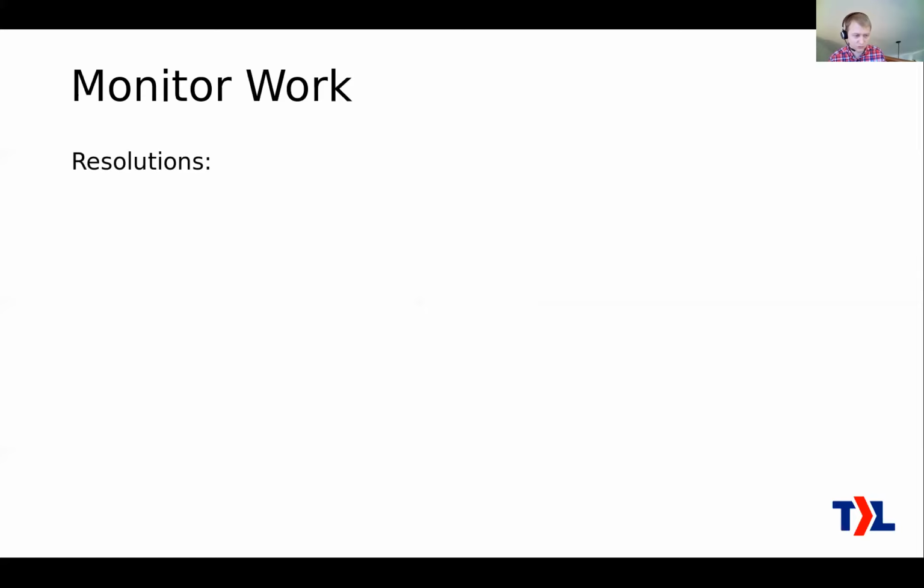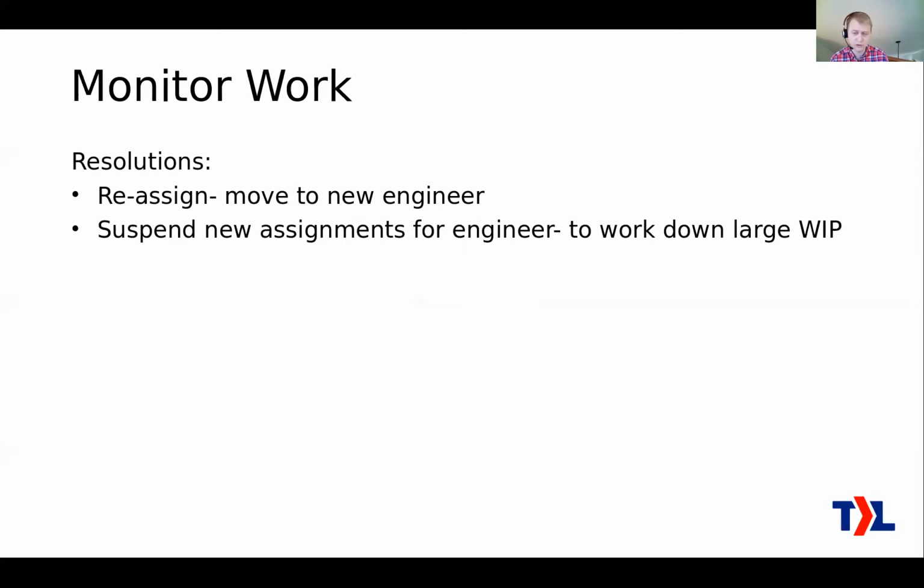Okay, so some of the resolutions here. If you see a problem, maybe you need to reassign that work to a new engineer. Pretty typical: if there's a bottleneck on one of your engineers, try to reassign that work to somebody else. Same thing, if you see a bottleneck, especially, suspend new assignments to that engineer. Just say, I'm not giving you any extra work till you work down all these tickets that you have.